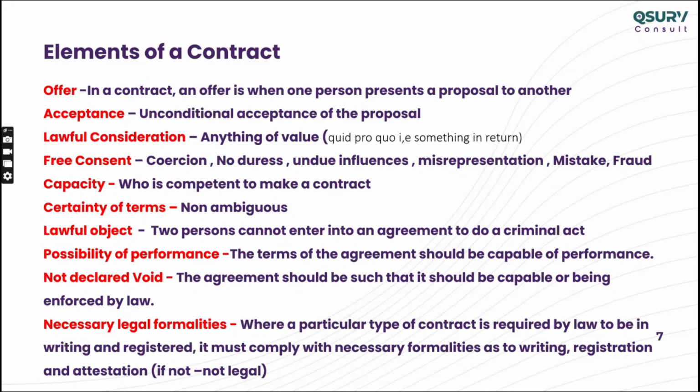This is called a counter offer. So when you receive a counter offer, your original offer is cancelled automatically. Again, it's a legal doctrine only, but you all need to understand what is meant by counter offer.